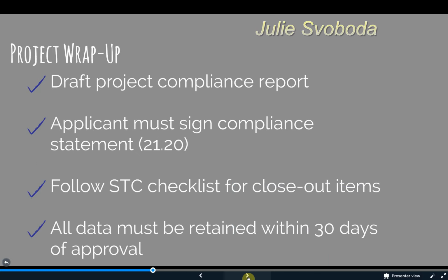When everything is completed for a project, a compliance report is generated to explain the outcomes versus what was originally planned. In Order 8110.4, this is called a certification summary report, and is summarized as an executive summary containing a high-level description of major issues and their resolution. The report should be used as a means for retaining corporate knowledge and lessons learned that could be beneficial for future projects involving the same or similar type design.